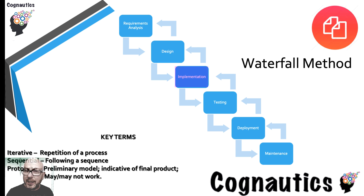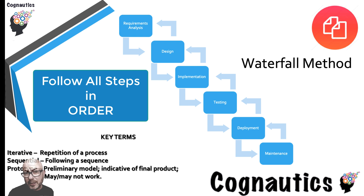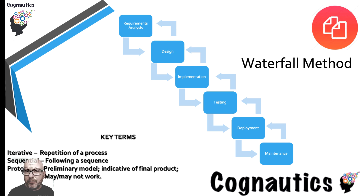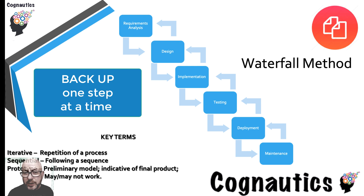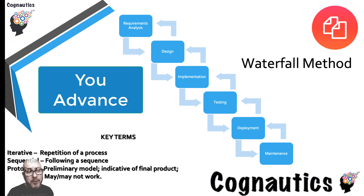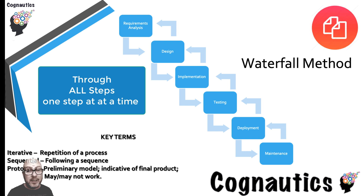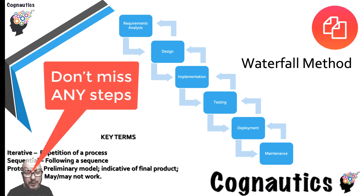You flow down the steps one by one until you get to the bottom — those are the same steps we talked about in previous videos. What makes this methodology different is, first, that you follow all the steps in order, which is logical. But the second key idea is that if there's an issue, you go back up one step — or as many steps as you like. However, when you come back down, you have to go down the steps in order. You can't miss any steps out.